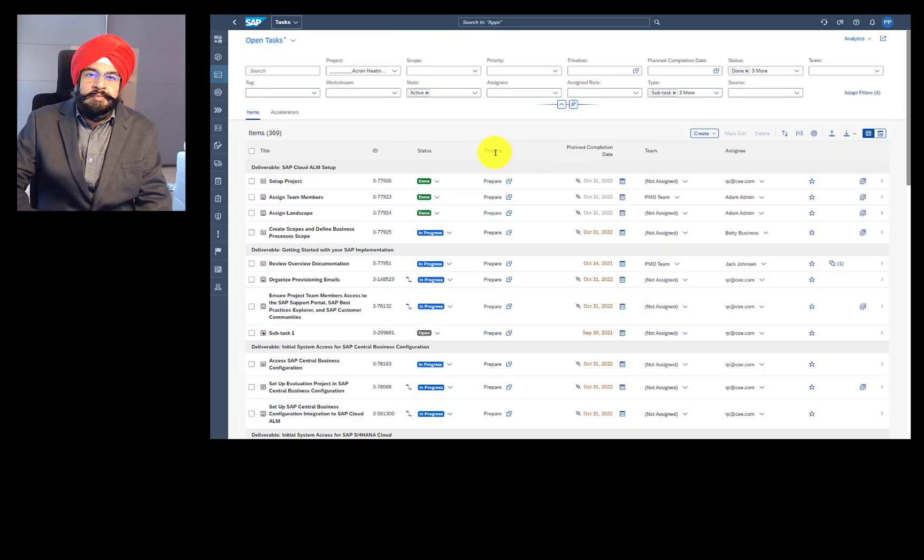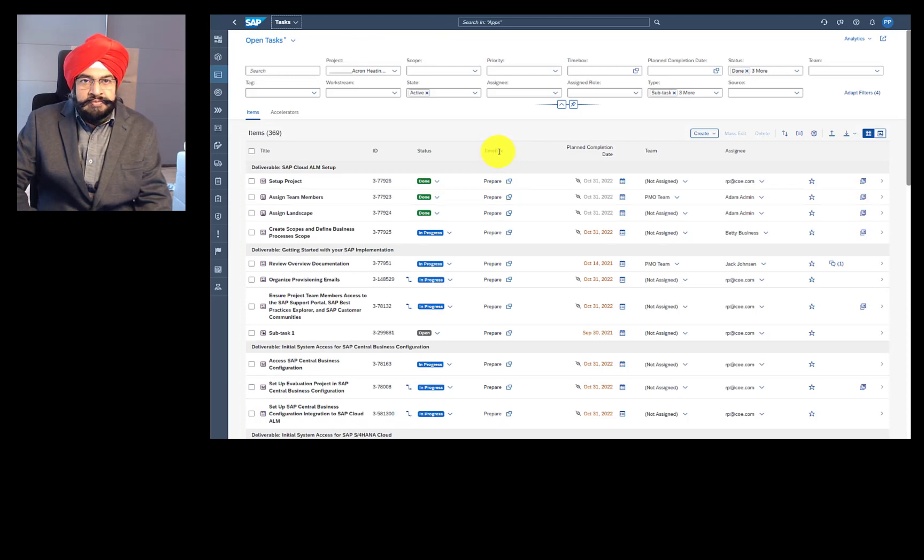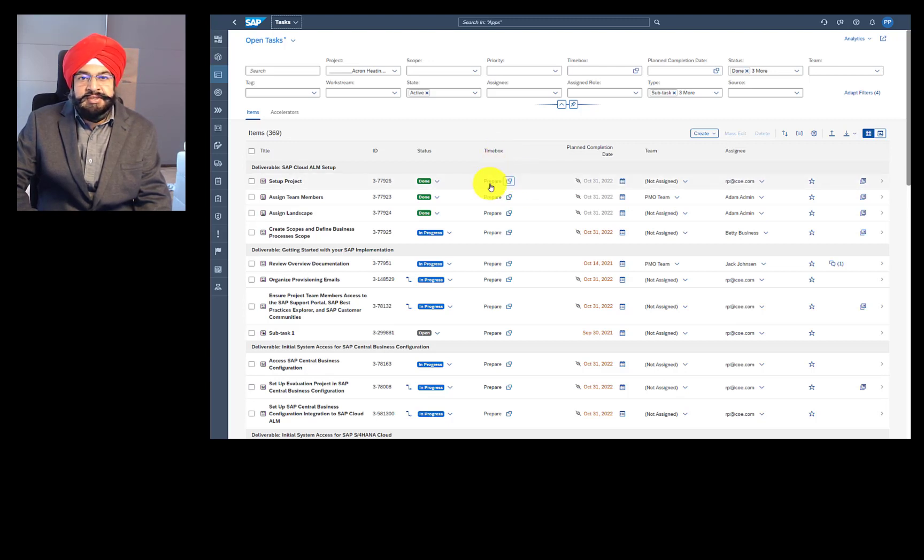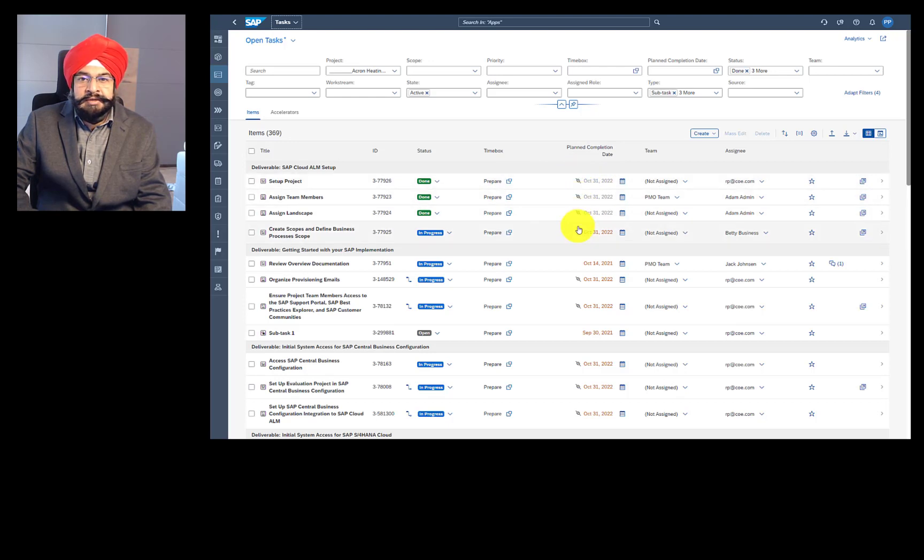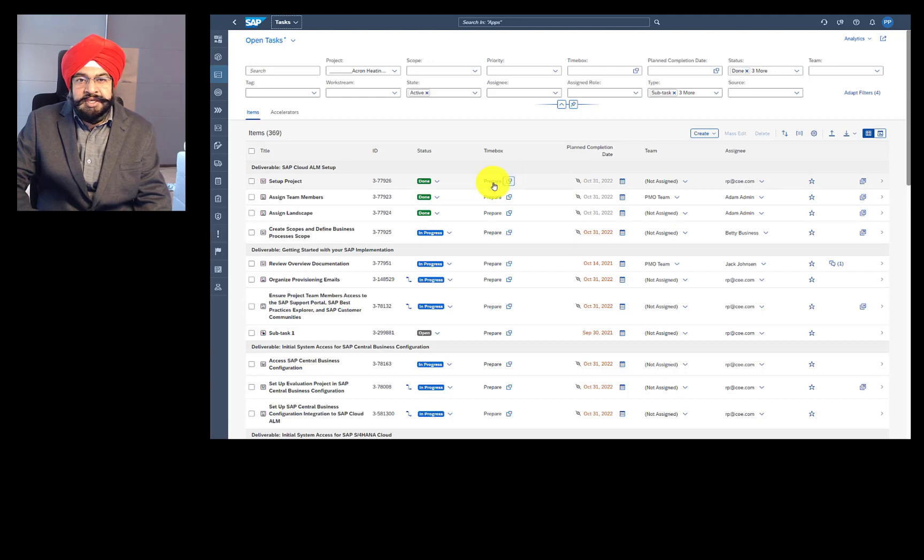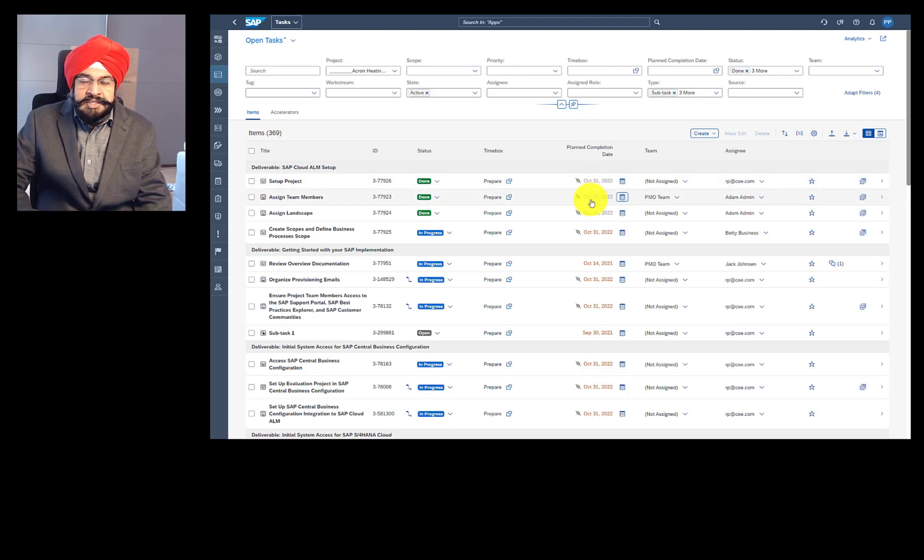And let's talk about now the timebox attribute. Timebox is a generic name that is given to a phase, sprint, and sometimes even a milestone. Tasks when assigned to timebox automatically get the end date of the timebox as due date. And it is also shown with this link icon. The advantage of that is dynamic scheduling. That means if the phase definition is updated, then all the link tasks are updated automatically.